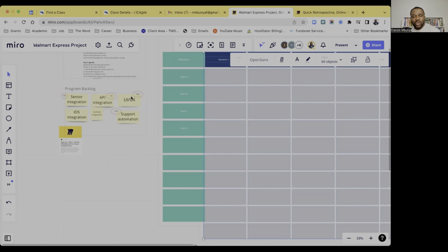Now, we cannot assign this work to team A all at once because let's say that they have a capacity of about 40 and we are running PI planning that is going to be, let's say, 6 iteration, right? Now, 6 iteration is going to be what? 40 times 6. And 40 times 6 is going to give us what? 240. So you realize that they can only complete 240 story point within, it's not going to be up to that. It's going to be 200 because in PI, we don't calculate the last iteration. But let's say that within the next 3 months, they can complete averagely about 260.